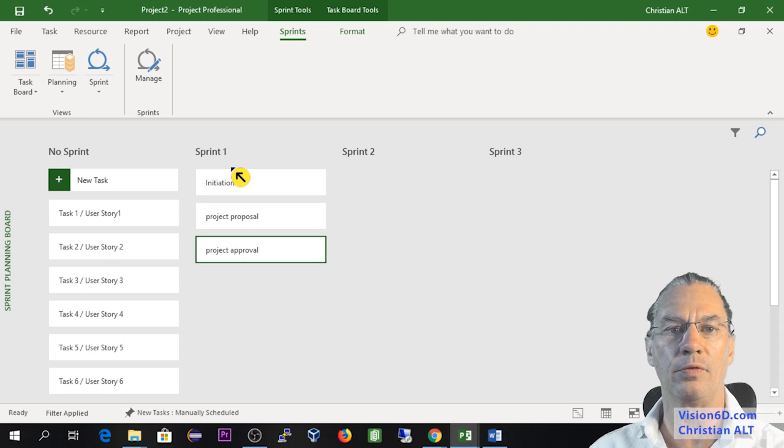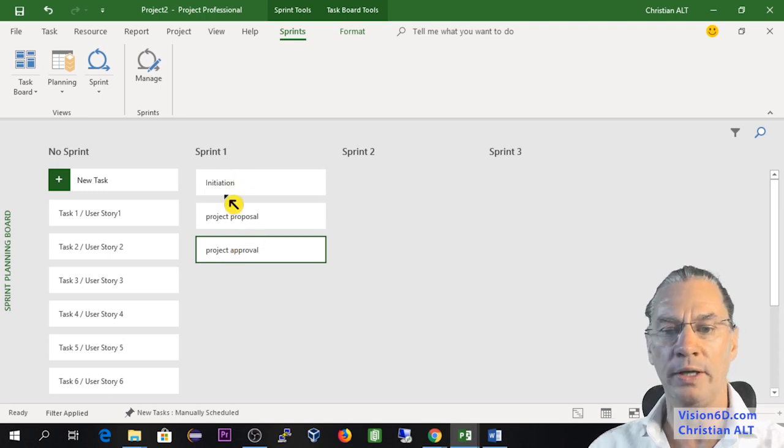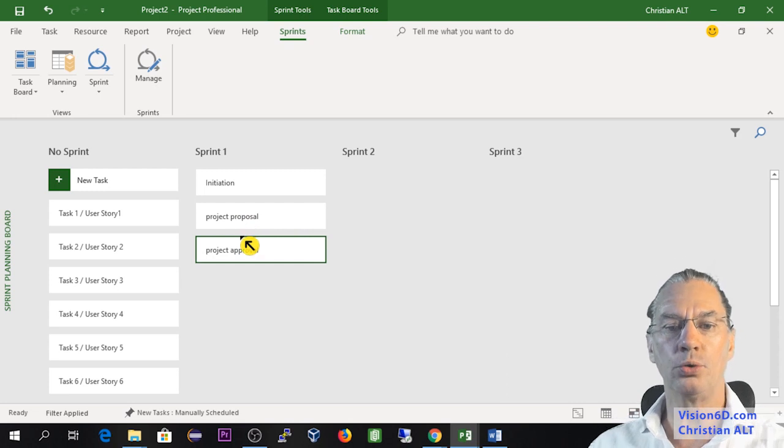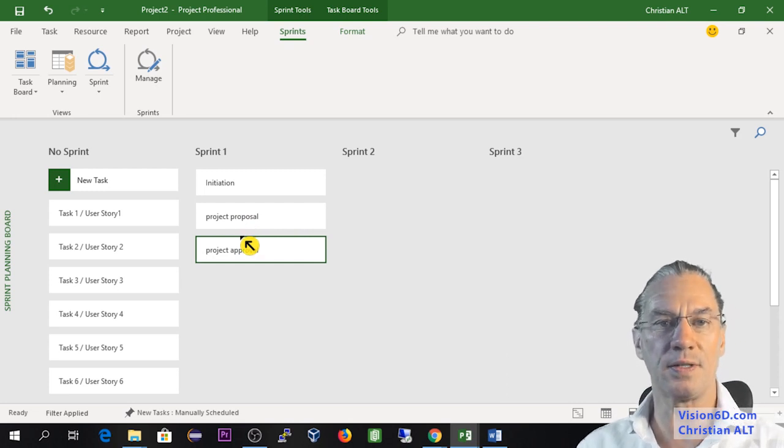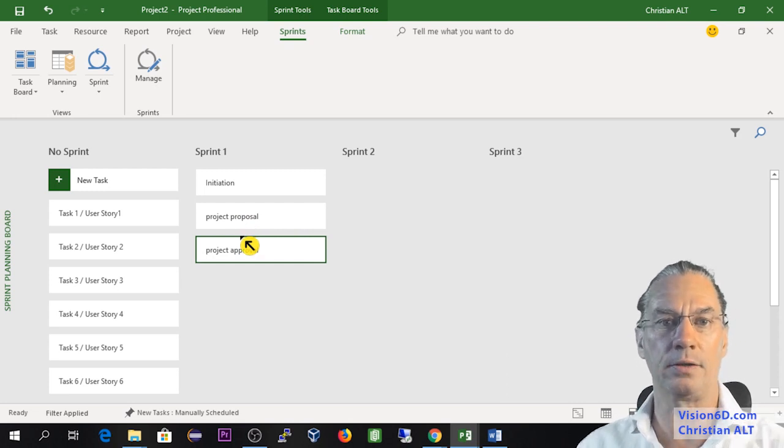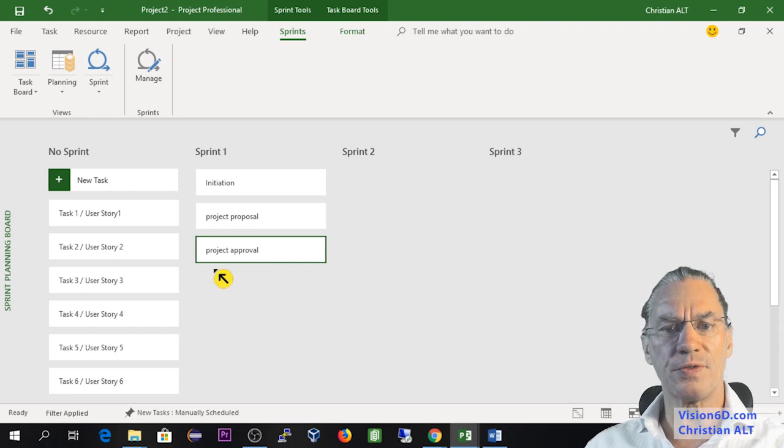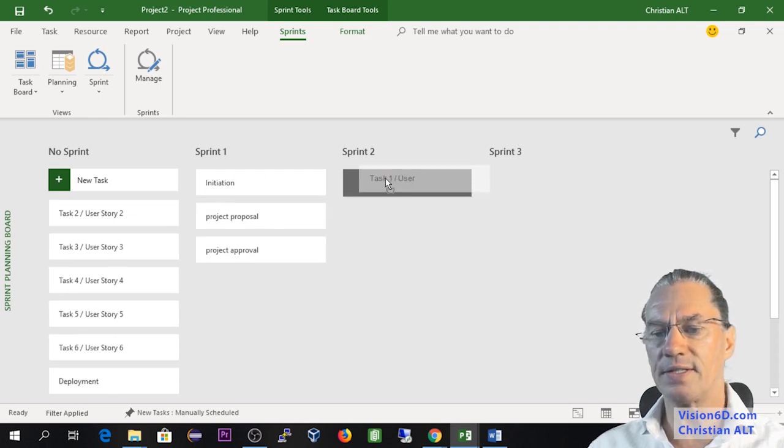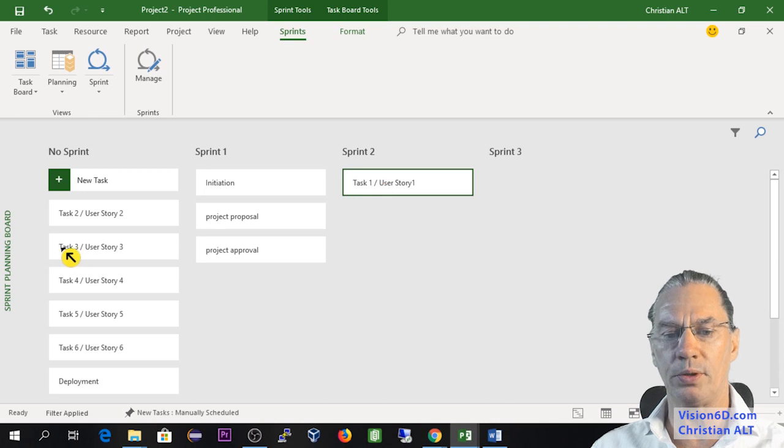The first part, which is initiation, project proposal, and project approval, is the first sprint. You could also realize this on the Gantt chart. This is my first sprint, and I'm going to schedule the second sprint where I will put user story 1 and user story 3.